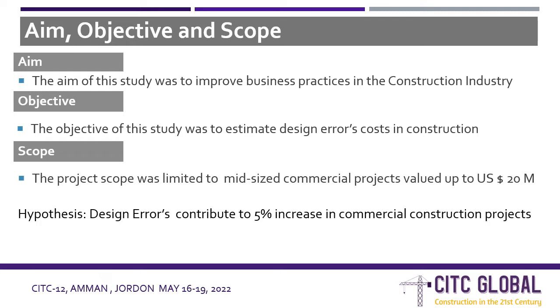The objective was to estimate the design error cost in the construction industry, and the overall scope considered was a project value within 20 million USD, mid-size commercial projects. And the basic hypothesis was that design error contributed 5% to the increase of the commercial construction project value.